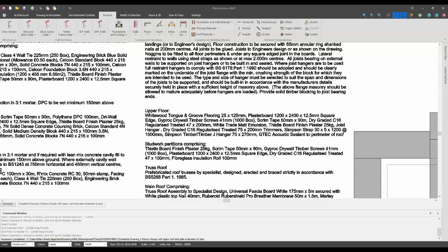Yeah, so that question about the current values. Whenever you do an estimate, it makes a copy of the price book at that moment, and then creates a job price book. That job price book remains as it is unless you synchronize it with the master price book. So if the job's been estimated and it's taken a couple of weeks, but prices have changed, the job price book will remain the same as it was when it was originally created, unless you synchronize any changes from the master price book. If that changed today, you can synchronize over and say, right, update the estimate based on these rates. So yeah, you can.